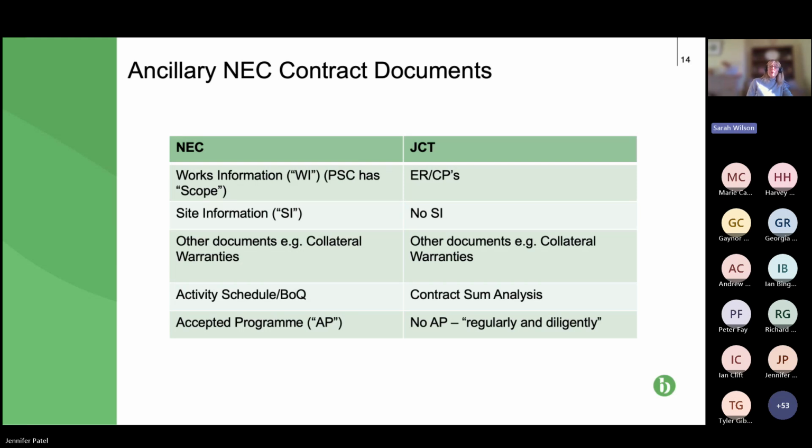And of course, if you look at it from the paying party's perspective, they know that all those programmes exist. So if you can't resolve the quantification of the time and the money for a compensation event, it's easy for the contractor or subcontractor, or should be easy, to adjudicate and get a determination.